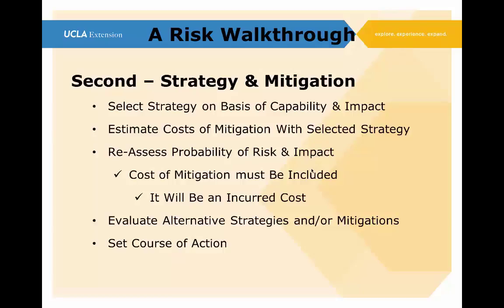And now we also need to know that if we're going to do some form of mitigation, any cost of that mitigation must be included because it will be an incurred cost. We will spend that money. That's got to go into our budget. So it's got to go into our project plan.